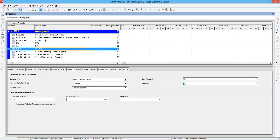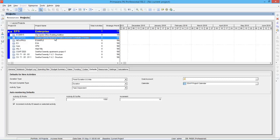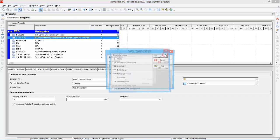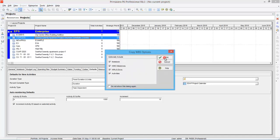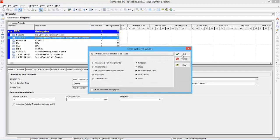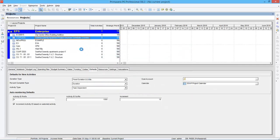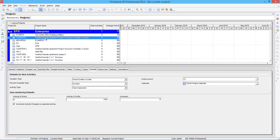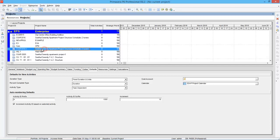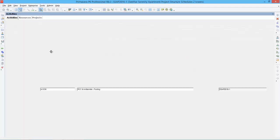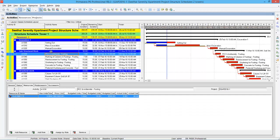So here is the example. This is a project, Shetal Serenity Apartment project structure schedule. Before you do a global change to one project, you have to copy it and paste it and try the global change whether it is working. If it is working then you can go for the real project. Because if you've done the global change then you cannot go back. So it's always better to copy the project and paste it here and do the global change here. If it is working then you can go back and do it in the real project.